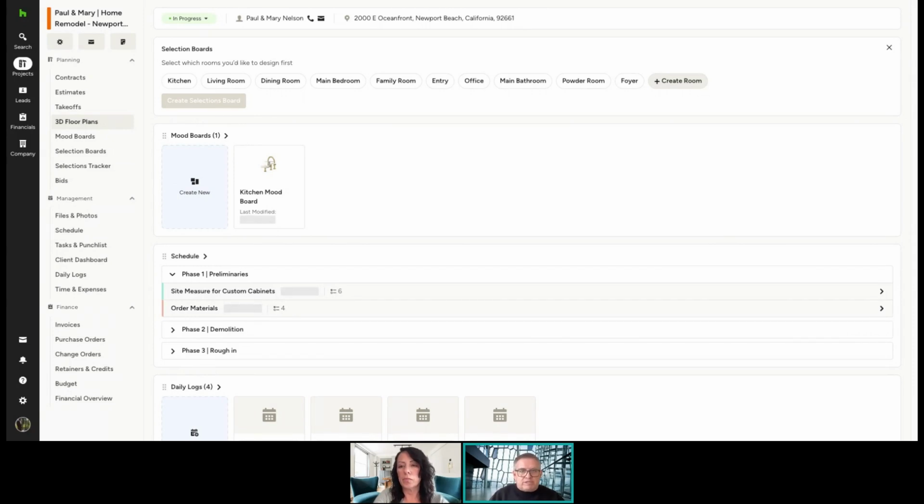You want to review it to make sure that it's according. It's not just about price. That's important. But if they're putting details about the materials they're using, you want to make sure you review that to approve it. That way you don't have anything slipping through the cracks, and then all of a sudden the sub says, hey, my bid said I didn't have to do this part or that, this is the kind of material I'm using. And so that's going to avoid any of those traps.